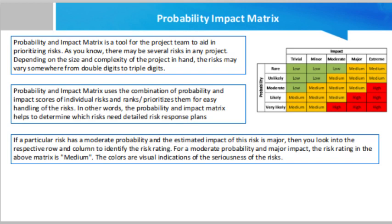There are various aspects of a project that can be affected by risk events, such as cost, safety, operation, and quality. A commonly used method for risk assessment is preparing descriptive scales to rate and rank risks in terms of probability and impact, often referred to as the Impact and Probability Matrix, which can take both qualitative and numerical values. It is a simple and easy-to-understand method of prioritizing risks and allocating resources. Other quantitative methods include sensitivity analysis, expected monetary value analysis, and Monte Carlo simulation.